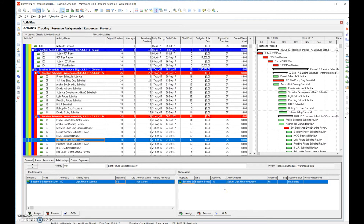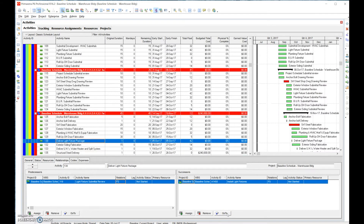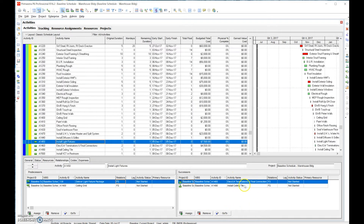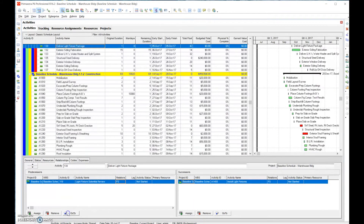Do we need to add an extra successor? In this case it makes sense — we do the submittal review, then we go to deliver the submittal. We can click the 'Go To' button to navigate to 'Deliver,' and from delivery we have 'Install the Light,' and then from there we install the ceiling tiles. So that's actually not a bad chain.